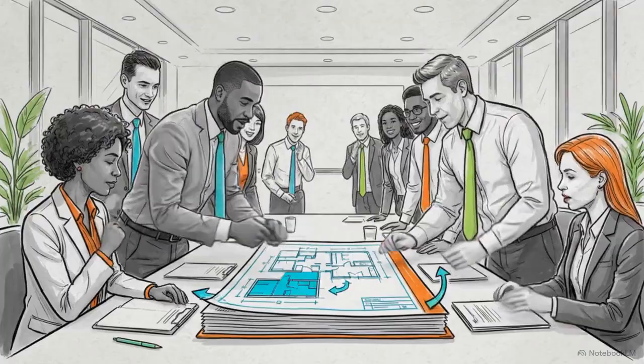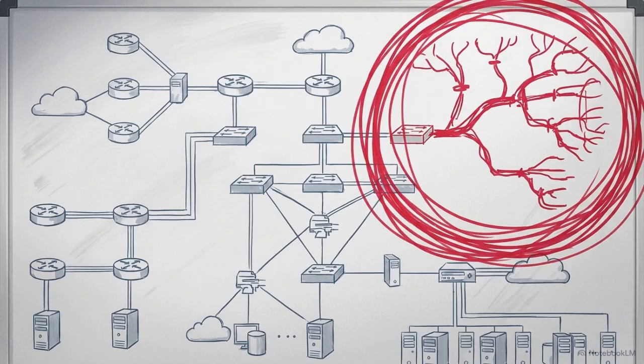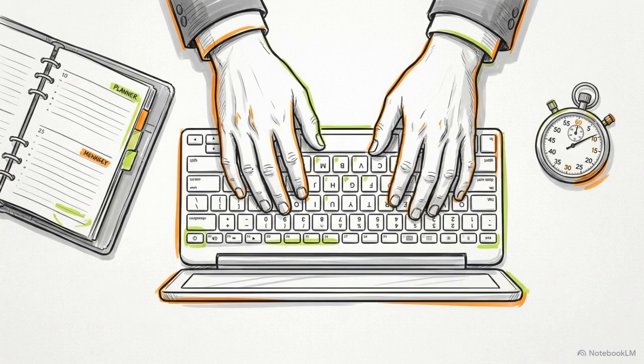buy-in. A major threat to any rollout is scope creep. This happens when new requirements, like deciding to add outpatient surgery features to an inpatient EHR rollout, are added after work has already begun, draining allocated money and staff. Project managers rely on specialized tracking tools to contain that scope and prevent timeline slippage prior to the delivery date.